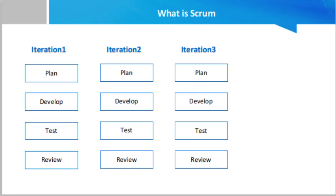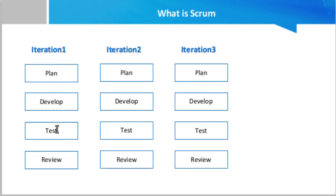How does the Scrum model solve this? In Scrum, we divide the work into multiple chunks. For example, if you are implementing an e-commerce solution with 40 tasks, you take 10 tasks first and do the planning, development, testing, review, and deployment. This is iteration one, or a sprint. A sprint is a three-to-four week time period. Then iteration two takes the next 10 tasks, and so on.